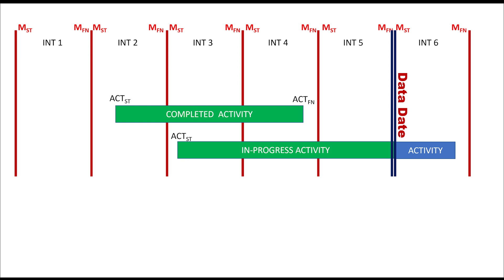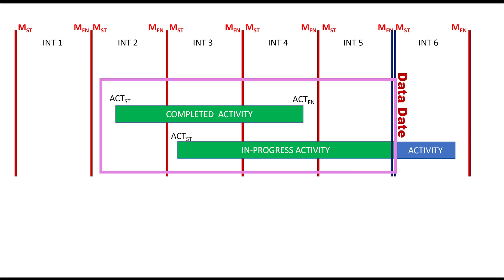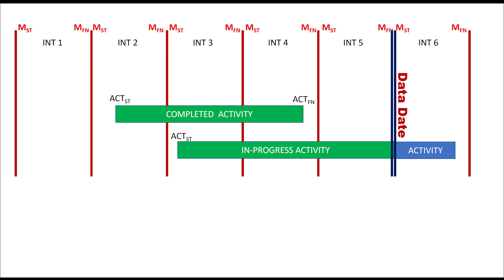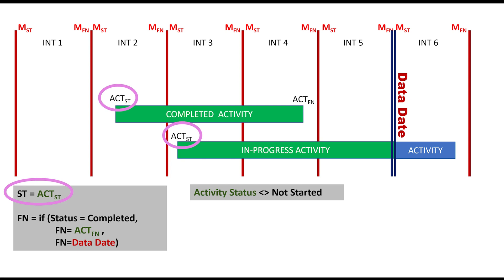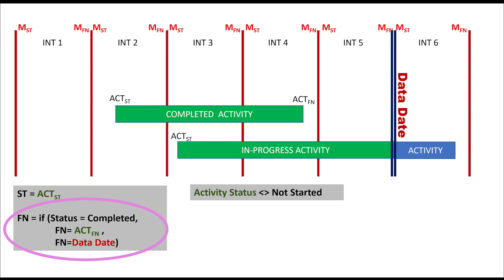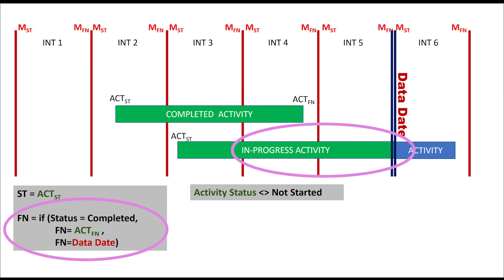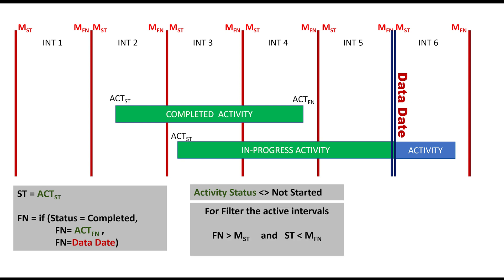Now I'll explain how to distribute earned value cost. We will distribute earned value cost for the part of the schedule before the data date, which means activities with status completed or in progress only. So first, we filter activities where activity status does not equal not started. For defining the dates: start (st) will be the actual start for any selected activity. For finish (fn), there are two cases: for activities with status completed, fn will be actual finish; for activities with status in progress, fn will equal the data date.